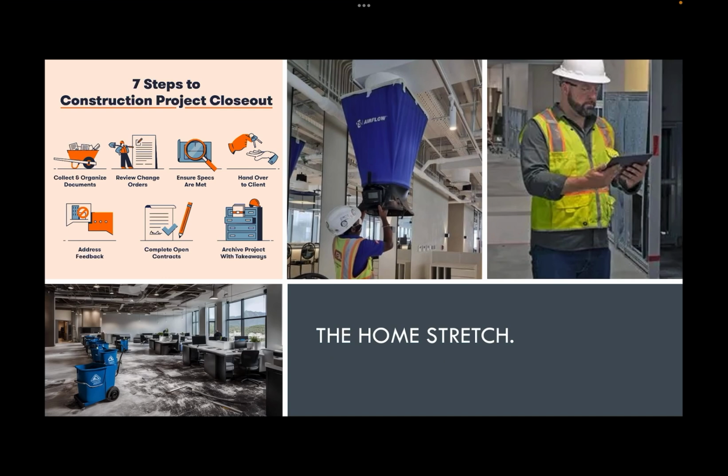So we have quite a few predecessors to test and balance. Getting the interior framing done, the interior doors, and etc. Even the furniture can have a small effect on the test and balance, so waiting till the very end of the project is a pretty good idea when it comes to test and balance. You can have doors that don't close because the building has too much pressure, or you have doors getting sucked closed because there's not enough air to fill the void in the building.